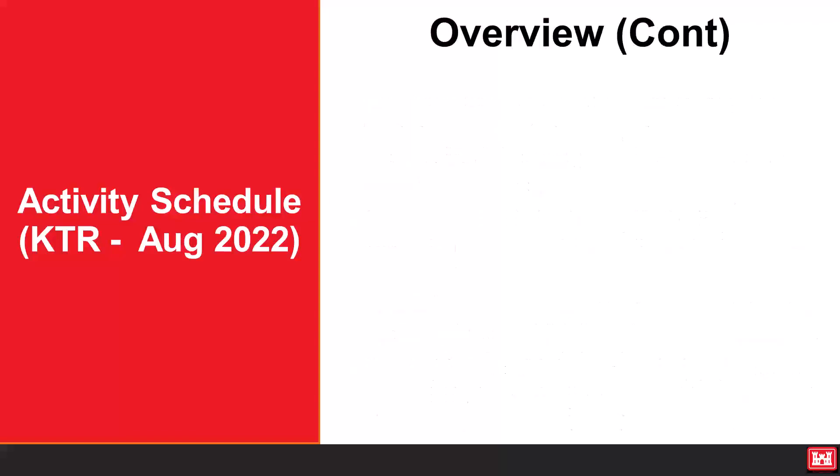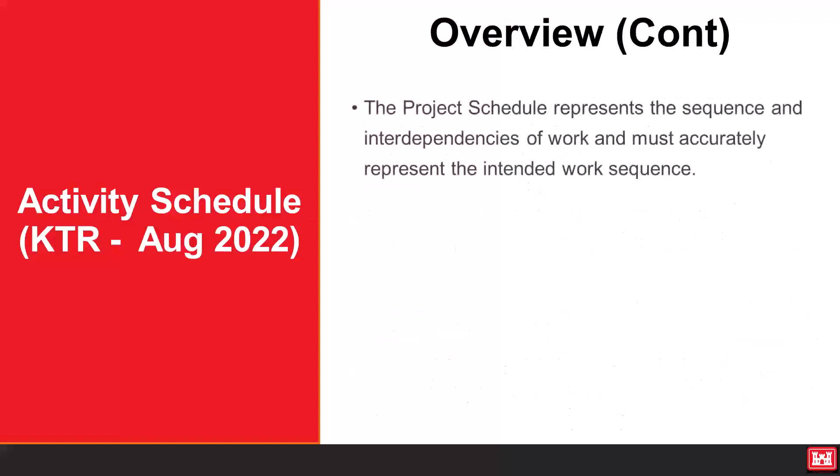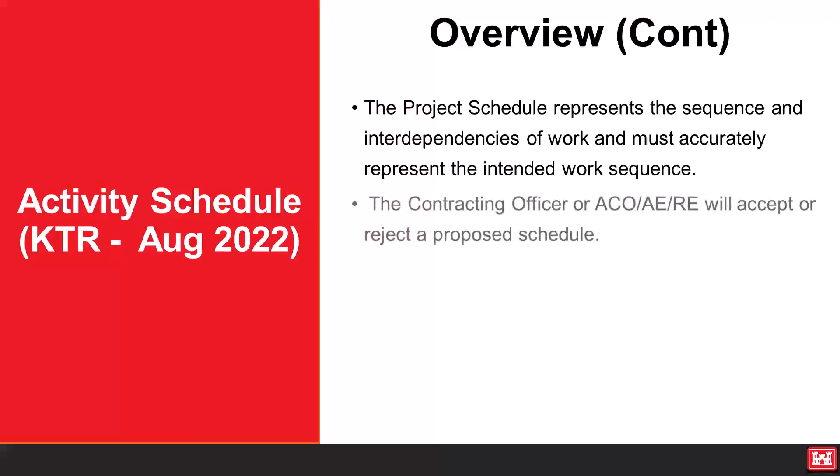The project schedule represents the sequence and interdependencies of work and must accurately represent the intended work sequence. The contracting officer or ACO, AE, RE will accept or reject a proposed schedule.